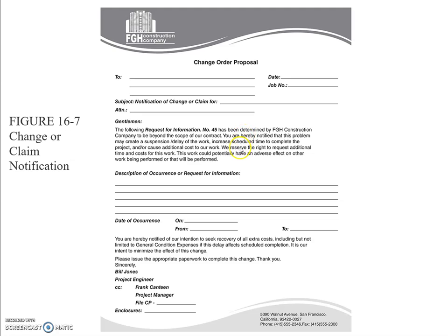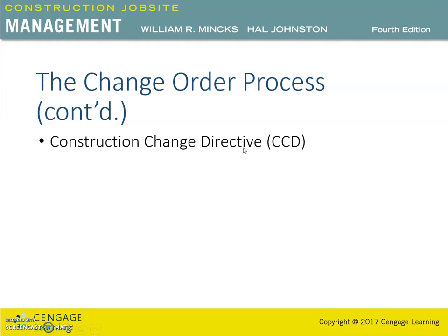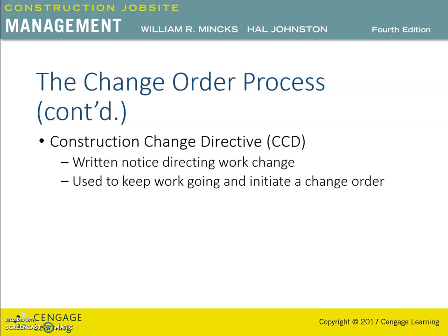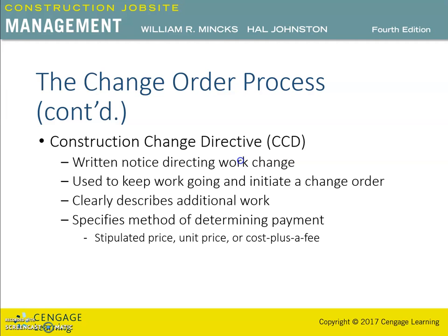In addition to the change order, a construction change directive (CCD) can be used by the architect to keep work going and initiate a change order. So the CCD is defined as a written notice directing a change in the work. This document can be used before a written change order has been fully agreed to by all parties.